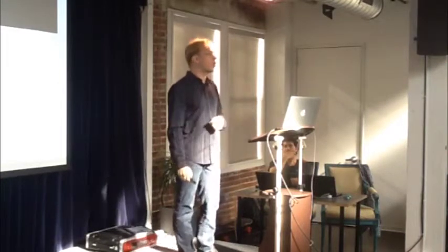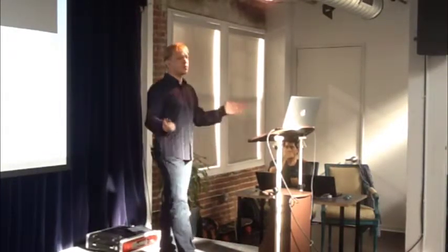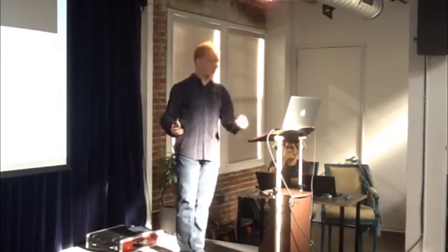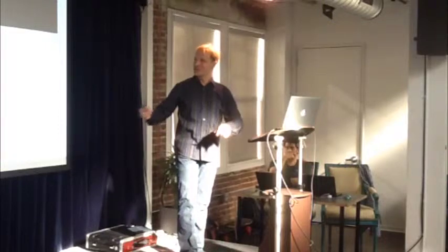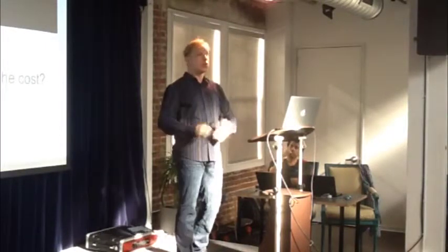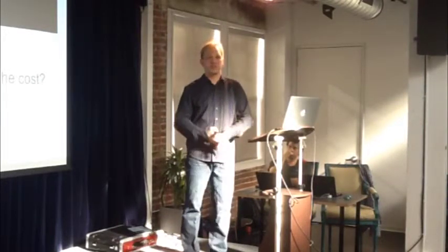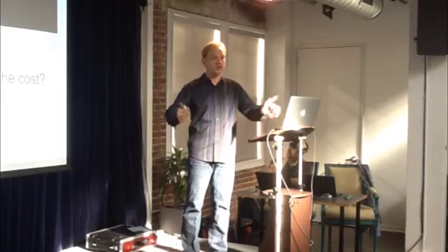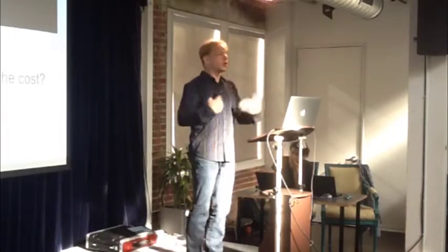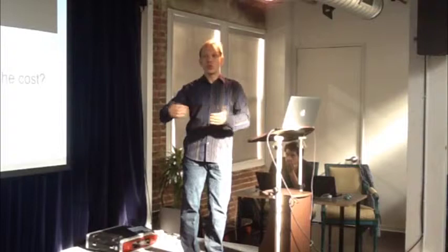Finally, evaluate all your ideas with business metrics. This is important anyway, right? This is a good business practice in general, but I'm going to talk about the effect it will have on scope creep. For every new idea you're considering, whether it comes internally or from a user, and this is my last point because we just crossed 30 minutes, ask: will this idea convert enough new users to be worth the amount I'm going to spend on it? If I think this is going to cost me $5,000 or $8,000, will it bring in enough new users to make enough revenue to be worth having spent that on it?